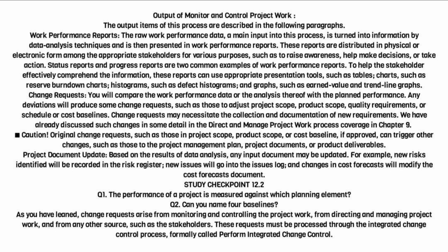Change requests. You will compare the work performance data or the analysis thereof with the planned performance. Any deviations will produce some change requests, such as those to adjust project scope, product scope, quality requirements, or schedule or cost baselines. Change requests may necessitate the collection and documentation of new requirements.